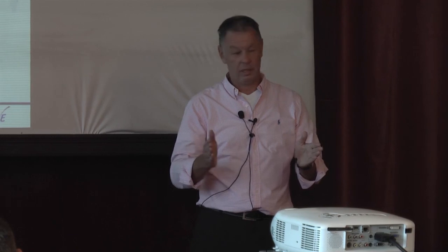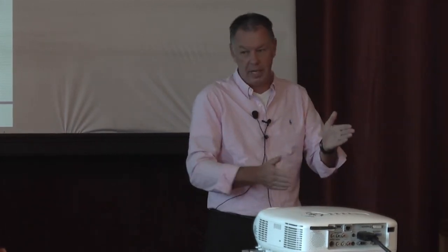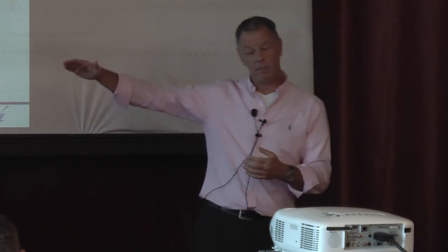Again, there's a huge difference, I think, here in Agile and traditional. In Agile, if you only have three weeks, you do it once and that's it. I mean, you can't go back. Well, you can in theory, but usually we do it up front, and anything which comes up we handle by daily scrum meetings or whatever, but there's only one in the beginning. If we do it in more traditional projects, then usually it says somewhere, I think the last part, track the risks. Then usually, if more information becomes available, we revisit the risk matrix and the factors.